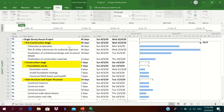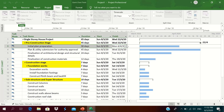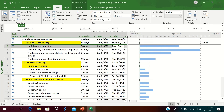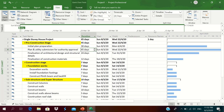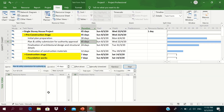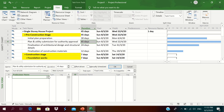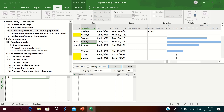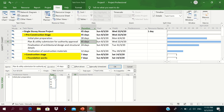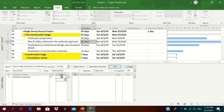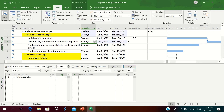To link activities and create relationships, we insert predecessor and successor columns. We can change details to show predecessor and successor and assign directly by adding the ID — for example, activity 4's predecessor is 3. We choose ID 3; the relationship is Finish-to-Start with a lag of 0 days. Activity 3 is now the predecessor for activity 4.